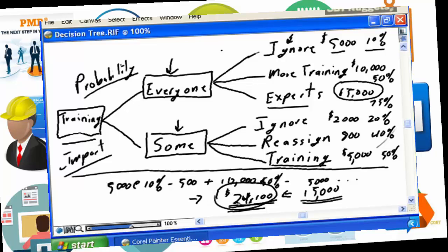I tend to believe that somewhere in the range of the 24,000 may be the appropriate answer, simply because it's accepting the fact that you may need to take multiple actions, based on the fact that there's absolutely a degree of imprecision related to each and every one of these numbers that you have evaluated.